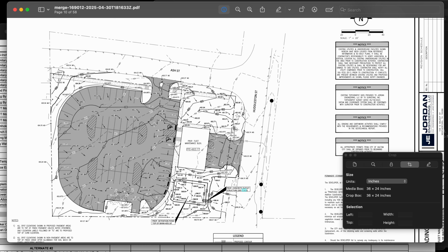So that way, in case we do export the soils, they know our price per truck, because we don't do it by what the job site may say, because each job site is different. We may go in there, and just because the soil swells up differently, you might have another additional 10 loads. Or you might not have enough, which is ideally the case. But the big factor of this is you always want to look at how much soil is going to be coming out, right?